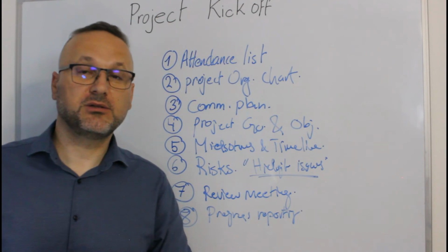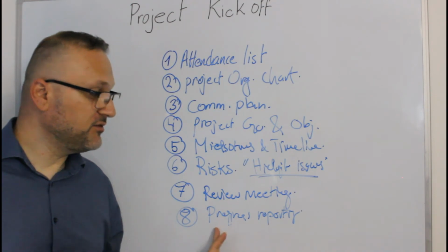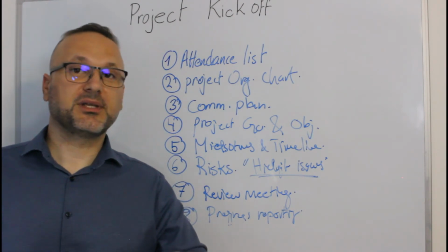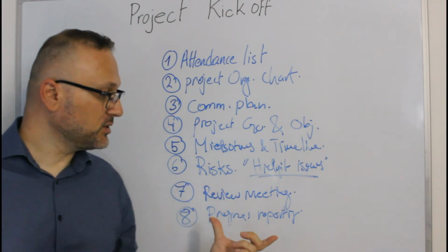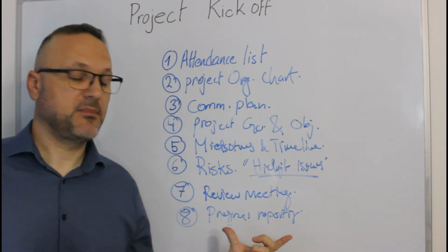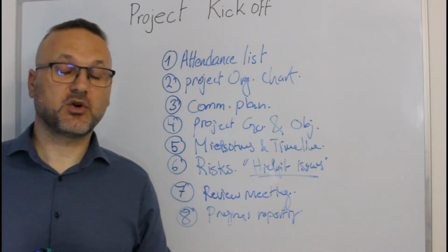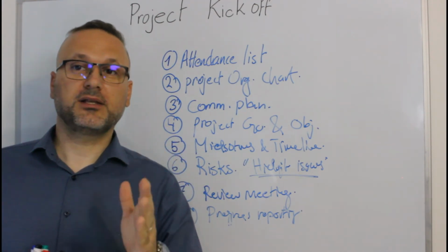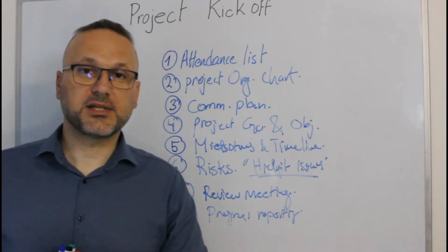Even if the management is not requiring or not requesting from you to deliver any report, as a project manager, you need to prepare the progress reporting and you need to share it with all involved parties. Those are important reports because once a risk is announced or once a problem occurs during the project, you can go back to your progress reporting and you can see the occurrence of the risk when it happened, what you have done, and what those results are.